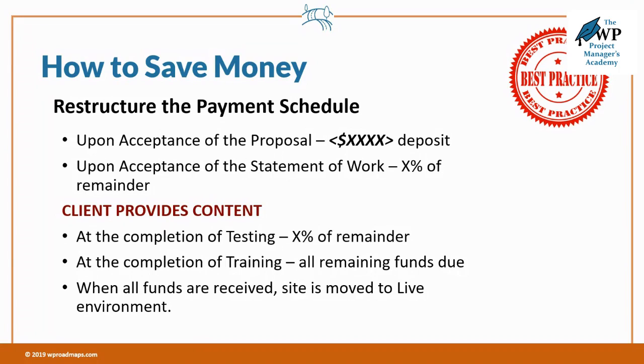At the completion of testing, we get usually 50% of the remainder. And then at the completion of training, we get all the remaining funds. But we do not move that site to the live environment until we get that final check.